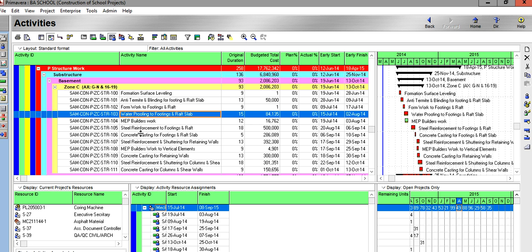Third, a common cause is failure to identify the key assumptions. So we have to make sure all our assumptions are reliable and applicable to the activity. That's why on a daily basis the engineer should be responsible for the program schedule of the activity and determine that it is achievable, and foresee the achievable duration and the activity dates.